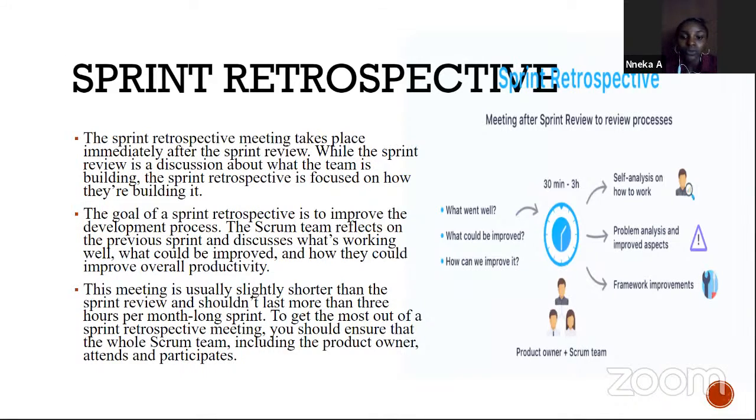So it's during the sprint review we get all those feedback and start working towards planning another sprint. And the sprint retrospective is the last Scrum ceremony, and this takes place immediately after the sprint review. While they are still discussing the sprint review with the stakeholders, the developers have their own meeting without the stakeholders this time.